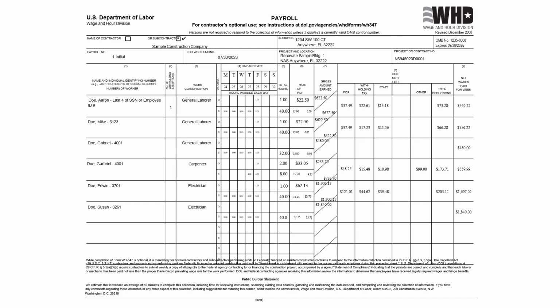If an employee performs multiple work classifications under the contract, use 2 or more lines to distinguish the different job classifications, hours worked, and hourly wage earned for each. On one line, list the first trade, the hours, the pay rate, and fringe, and gross wages on the top portion of the column. On a separate line, list the second trade, hours, pay, and fringe, and then tabulate the gross earned for this trade.